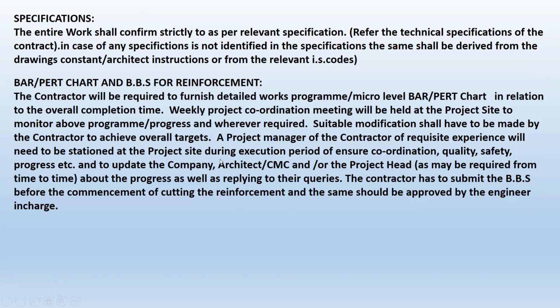Moreover, to monitor the project, the contractor has to submit a bar chart. In which format? Whether Excel format or MSP format or Primavera, etc., has to be defined by the work order.